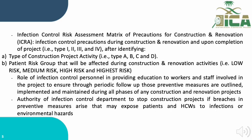After matching the type of construction project activity with the patient risk group, we identify the construction class: Type 1, 2, 3, or 4. For each type, there are specific interventions and measures that must be implemented pre-construction, during construction, and post-construction.